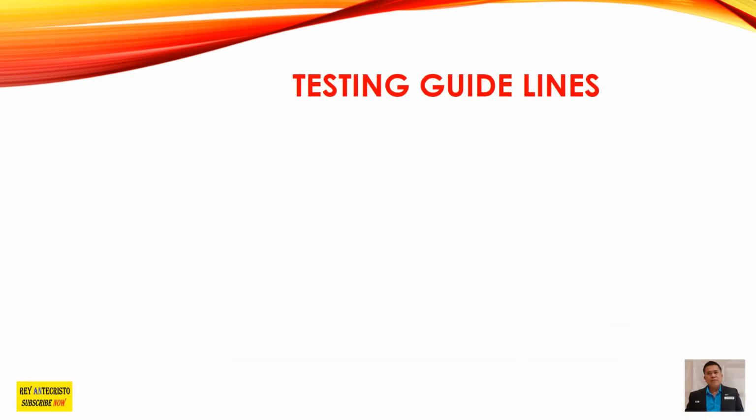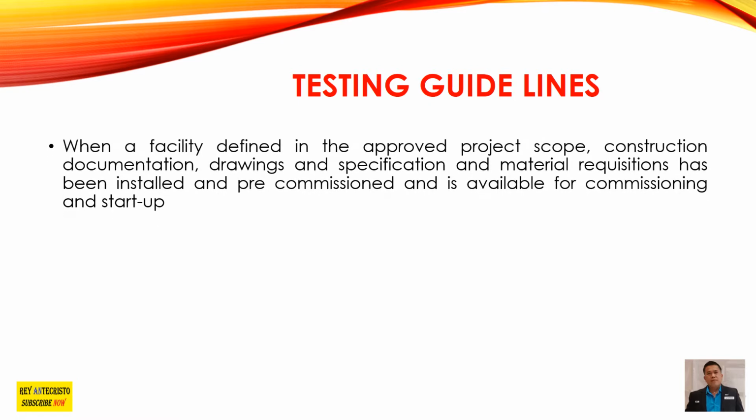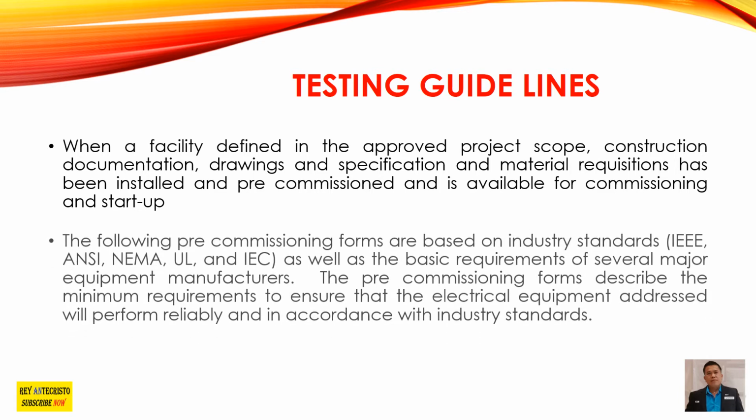So this is our guidelines. When a facility defined in the approved project scope, construction documentation, drawings, specification, and material requisition has been installed and pre-commissioned and is available for commissioning and startup. So this is the guidelines.